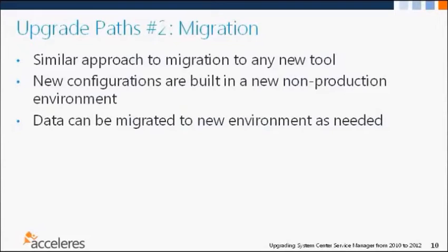And it's really following that kind of process. You build a brand new environment. You can duplicate your Service Manager 2010 functionality because 2012 is backwards compatible with all of your 2010 configurations. And then you can configure all of your new configurations, your new customizations, build out your portal, and then have a cutover as opposed to an upgrade.